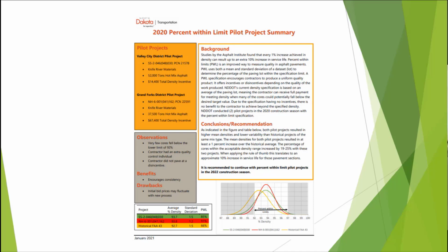And really, when you look at that, both of those PWL jobs showed their mettle, right? If you pay somebody to get that performance, in the case of, I think, the Highway 46 job, the contractor had a person just doing quality control, doing the measurements. I don't know if it was nuke gauge or non-nuke, but doing it. And what you're looking for is you want that peak to be near the center, that 92 to 97, and the peak to be high and the base narrow.